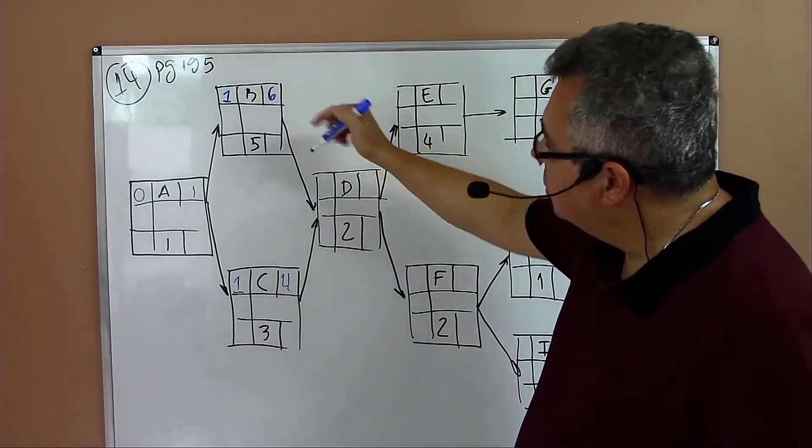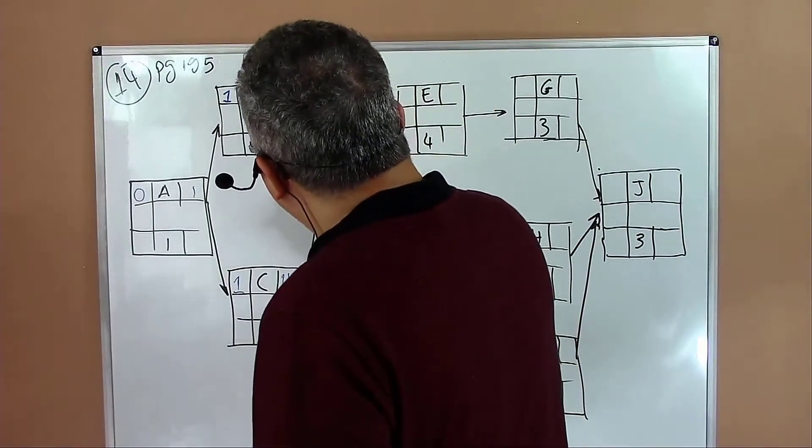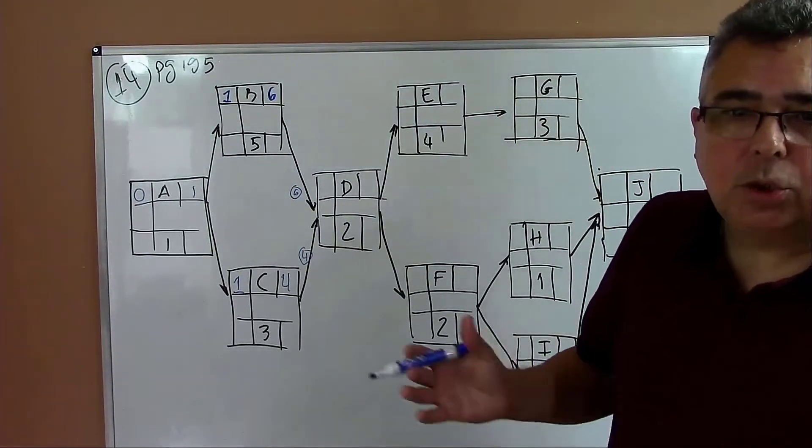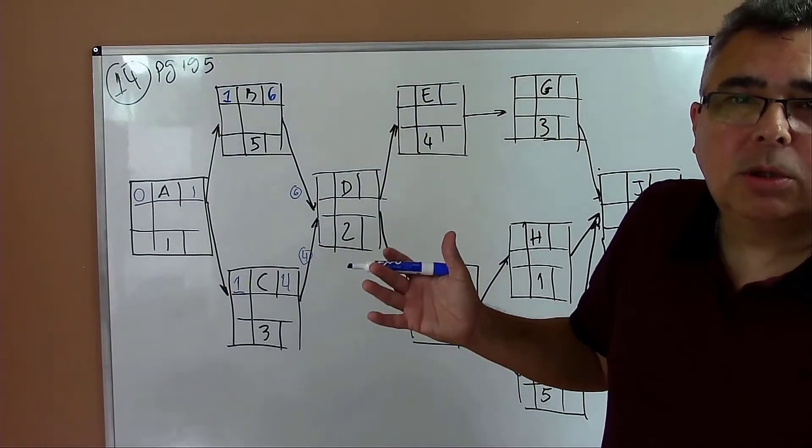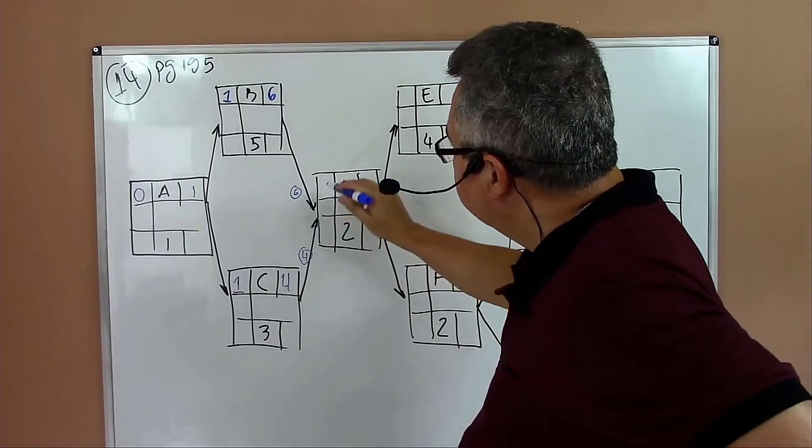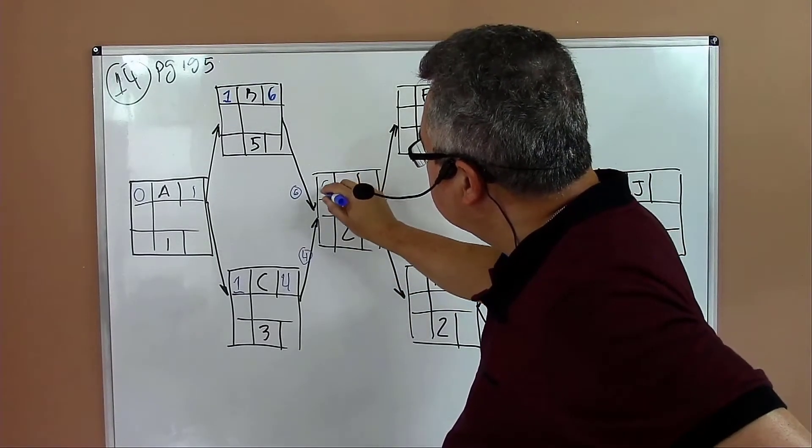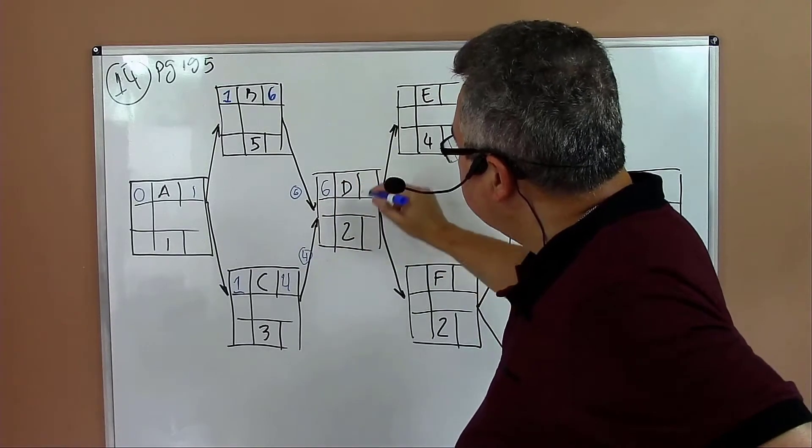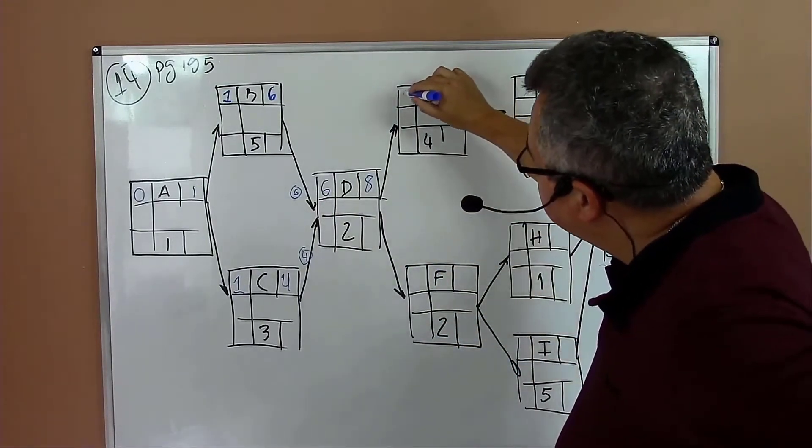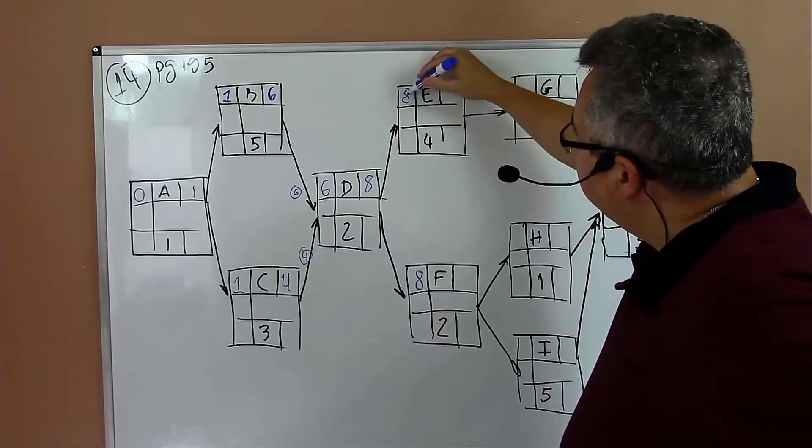One plus five equals six. One plus three equals four. Now to compute the times for activity D, we need to consider six that is coming from activity B and four that's coming from activity C. Because it's a forward path, we should take the highest number. So you take six, then six plus two equals eight.